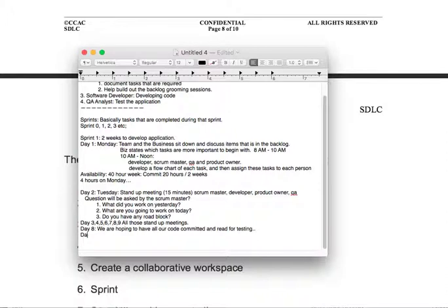Let's say that you don't have it ready for testing. What happens? Well, a good chance is that the sprint you're working on is going to fail, and it's not going to be ready for the client to view the next week. So let's say everything is working fine. Day 8 is perfect. We tested it. Day 9 is Thursday. What are we doing? We're just finishing up on bugs, any bugs that were reported. On day 10, we're completed.